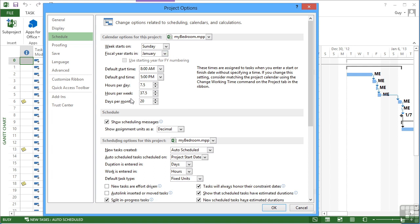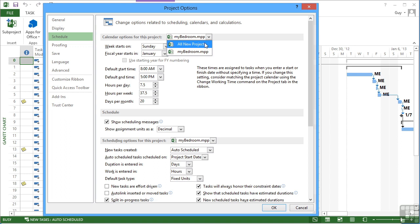So these defaults control the current project. If you were to change that to all new projects, then it would change not only this project but all the projects from now on. Let's see the effect of leaving it on My Bedroom now that I've shortened the day by half an hour and the week by two and a half hours.